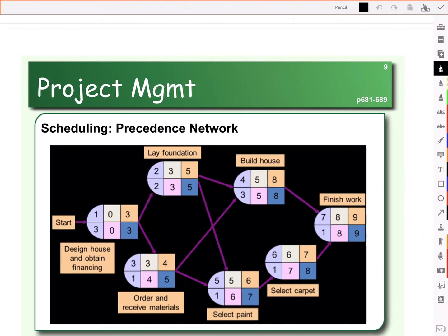So what we see here for the activities is that you can see on the top the early starts, early finishes, and on the bottom the late start, late finish. So for example, here in activity 2, in this light green you see the early start is 3, and in this pink you see the late start is 3. So no slack in activity 2.